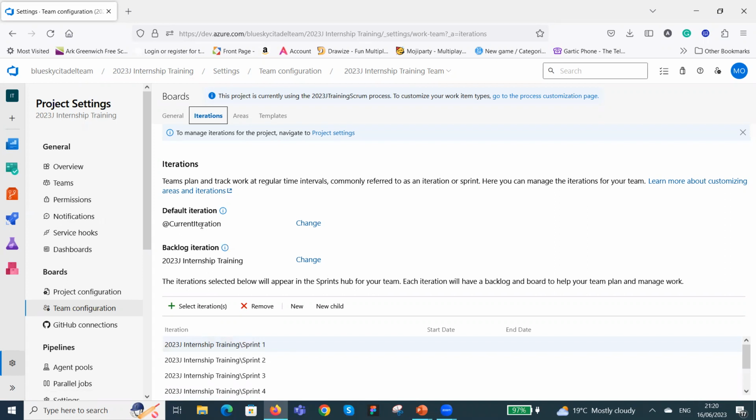Now, if we don't change this, if we leave it the way it is right now, what happens is every time you are in sprint and the BAs are creating the stories in the backlog, those stories automatically go into your sprint. And they are not meant to go automatically into your sprint, because what is inside your sprint is what you've planned for and what you've committed to. So the new stories they are writing are not meant to go into the sprint. But if you leave the default state, they would automatically go into it.